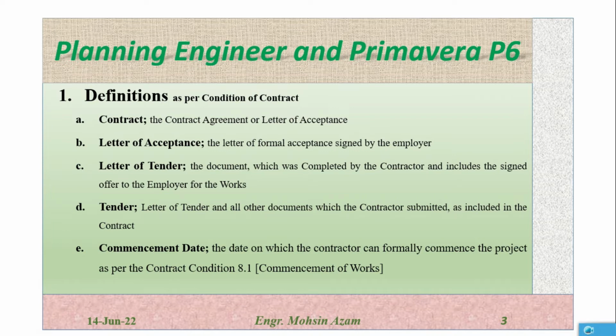Letter of tender. Letter of tender is the document which was completed by the contractor and includes the signed offer to the employer for the work. So after bidding, the contractor will prepare all the documents and will submit all the documents to the client with the final offer or the quotation for the work or for the project.